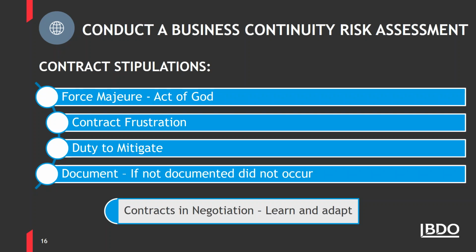With respect to the COVID-19 pandemic, most force majeure clauses will not literally include words such as epidemic or pandemic. You may notice terms like unavoidable labor shortages or something similar, which may trigger this clause.